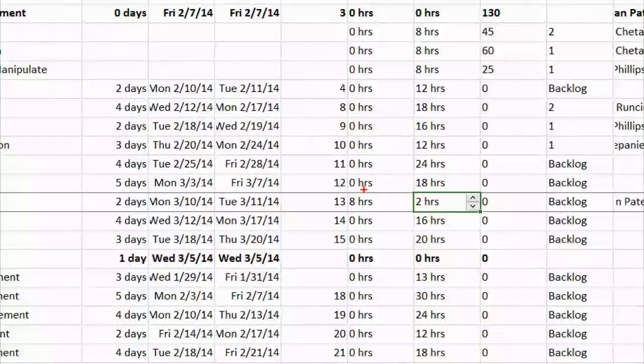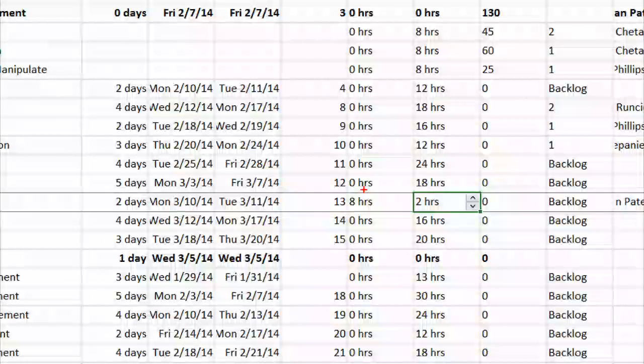No, that's not correct. Yeah, the answer is, let me repeat the comment for the recording: it's not capturing time-phased actuals, and that is false. It is capturing time-phased actuals on that activity because it has to go against the task. Now, in TFS, we're not saying on Tuesday I did this type of work. It's saying here's actuals remaining. It begins moving there. Chaitan, you want to expand upon that?